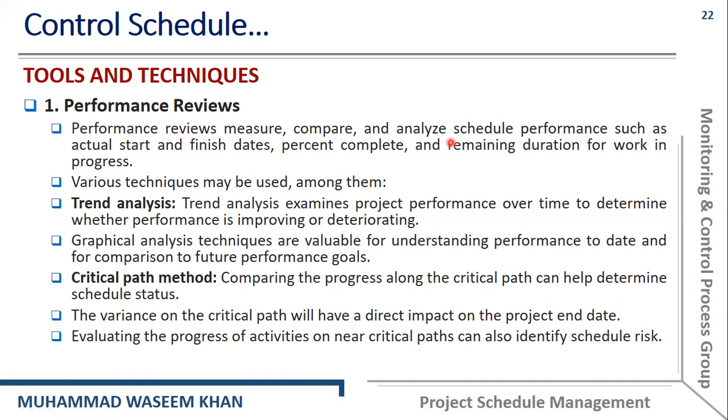So we can use different performance review techniques. The first one is trend analysis. Trend analysis examines the project performance over time to determine whether performance is improving or deteriorating. Graphical analysis techniques are valuable for understanding performance to date and for comparison to future performance goals.